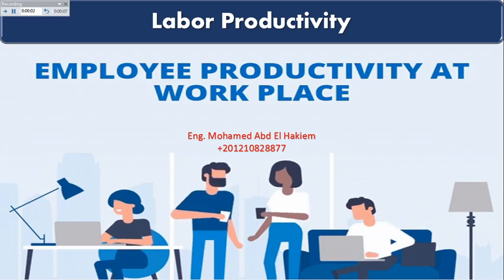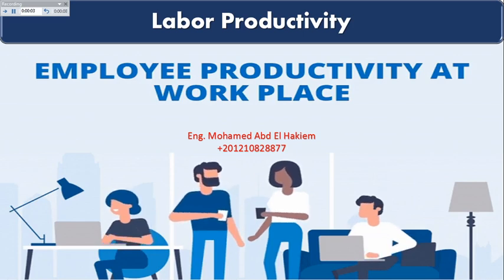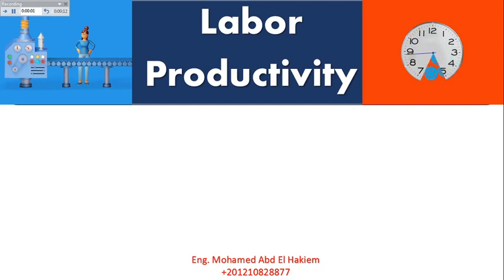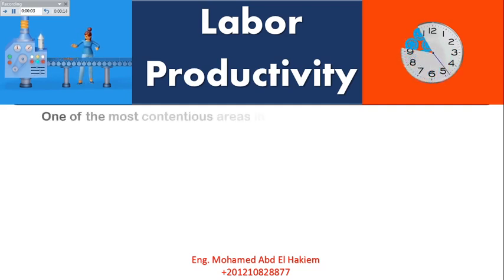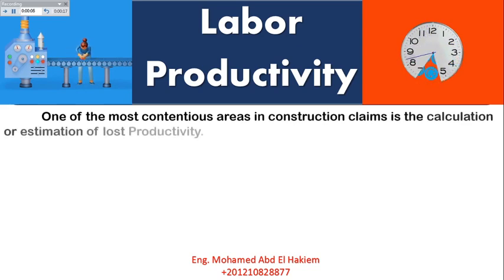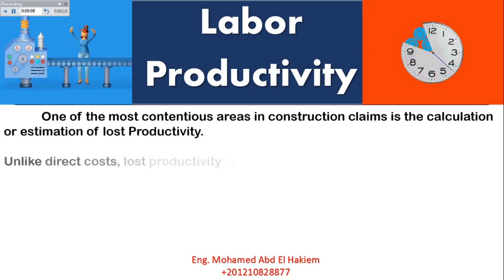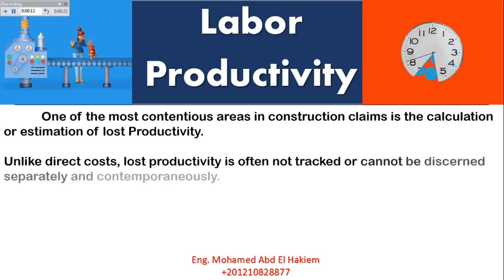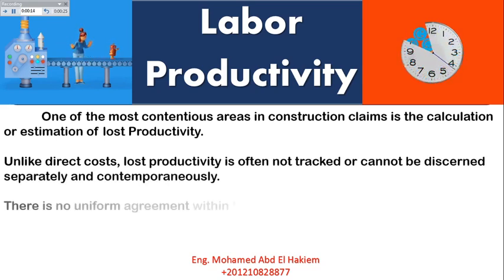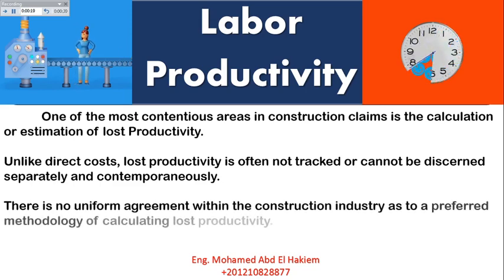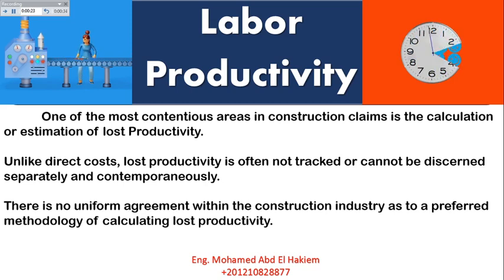What is labor productivity and how is it estimated in construction claims? One of the most contentious areas in construction claims is the calculation or estimation of lost productivity. Unlike direct costs, lost productivity is often not tracked or cannot be discerned separately and contemporaneously. There is no uniform agreement within the construction industry as to a preferred methodology of calculating lost productivity.